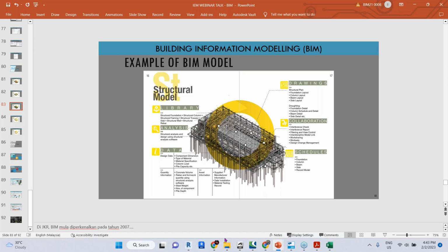For design build, it will show where the gateway is, to make sure before we go to the next stage. For example, we want to make sure the design issue is already solved. If not yet, they cannot go to LOD 300. That is some sort of mechanism in the BIM process.